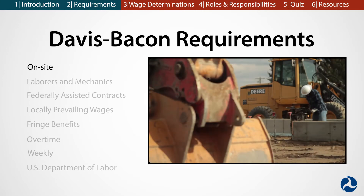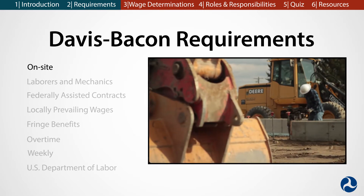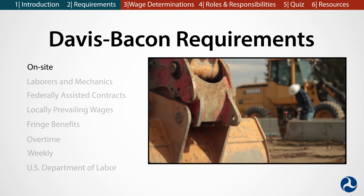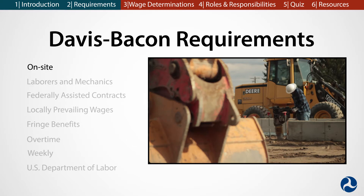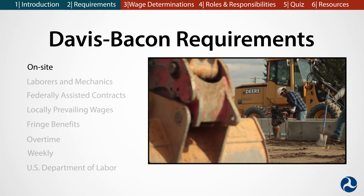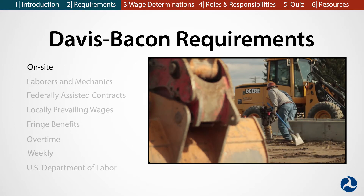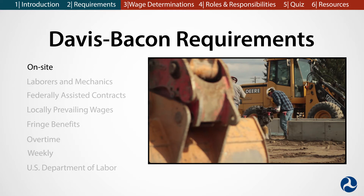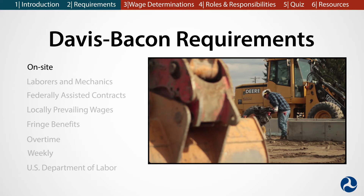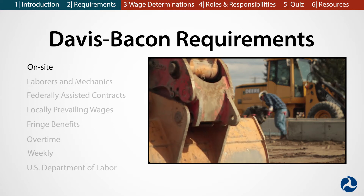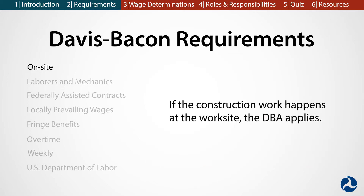On-site. The DBA only applies to work done at the site of work. The site of work is defined as the physical place where the construction actually takes place. It does not apply to work performed at a factory to make a part that is being used for the project. If the construction work happens at the work site, the DBA applies.